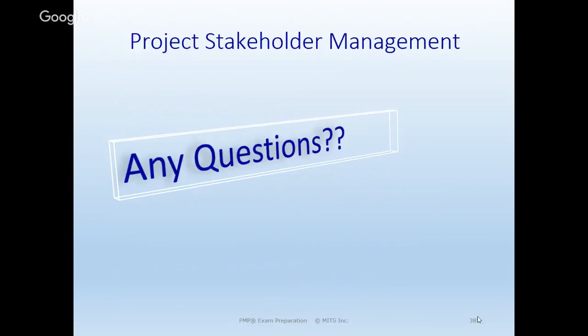Although I know in my world, a lot of times that upfront planning might say we need 20 developers, and we might use a placeholder, we call it a planning resource, that was equal to 20 people. And then as we got into developing it out more, we take away the 20 and put in the 20 names of the people that were going to work on it. But to your point earlier, bottom-up estimating, well, if we don't have those 20 people in place, how can they do bottom-up estimating?